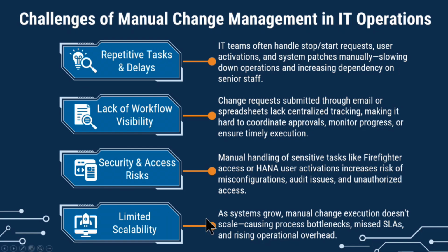So there are bottlenecks. For instance, if you're requesting a 30-minute window to implement a kernel patch across multiple systems, and you're spending most of the time doing manual stop-start, that can cause outages and missing the downtime window, right? So missing the SLA as well.